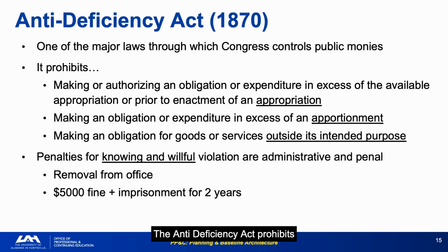The Anti-Deficiency Act prohibits 3 forms of unauthorized spending: exceeding available appropriations, exceeding apportionments, and spending for purposes outside the appropriation's intent. Knowing and willful violations result in removal from office and criminal penalties.